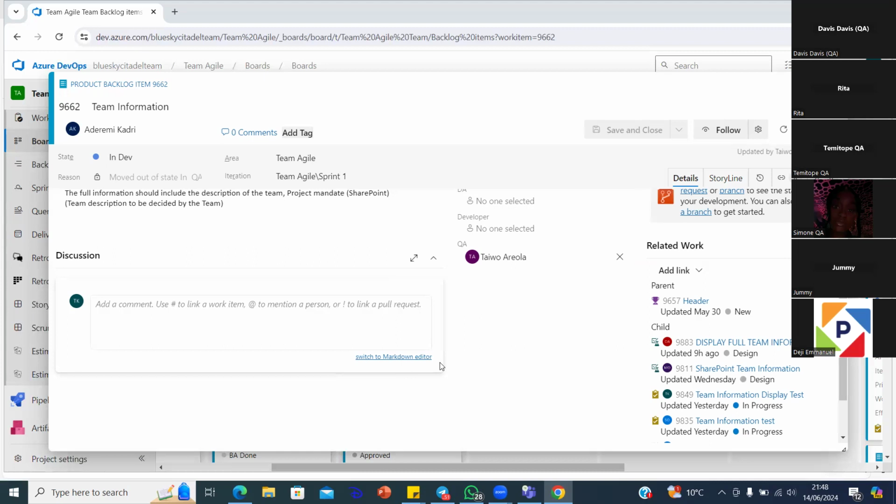And let's say it's a bug that someone actually mentioned now, that's just a minor bug, and I've added it to the comment. A bug like that you will raise, but you won't put it in committed, right? You will only put it in the backlog, because when the developer has time, then you can triage it and push it forward. So that's how you're going to work it.